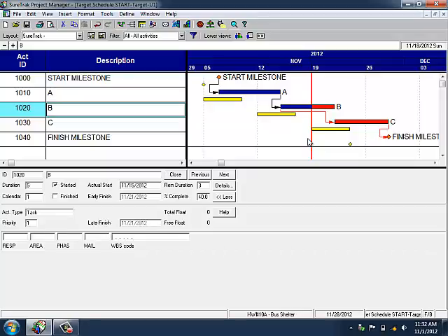And the SureTrak schedules literally showed that, and we paid 2 grad students that went out and took almost 1,000 photographs and verified every detail on those schedule updates before that bonus check was written. And there was not one activity that didn't meet the bonus requirements, period. But we checked it, and it took us lots of man hours with our 2 grad students to verify against the target schedules they submitted and their claim for the $2.1 million. We had to certify for DOT they earned the $2.1 million in a written report. It's a lot of money.